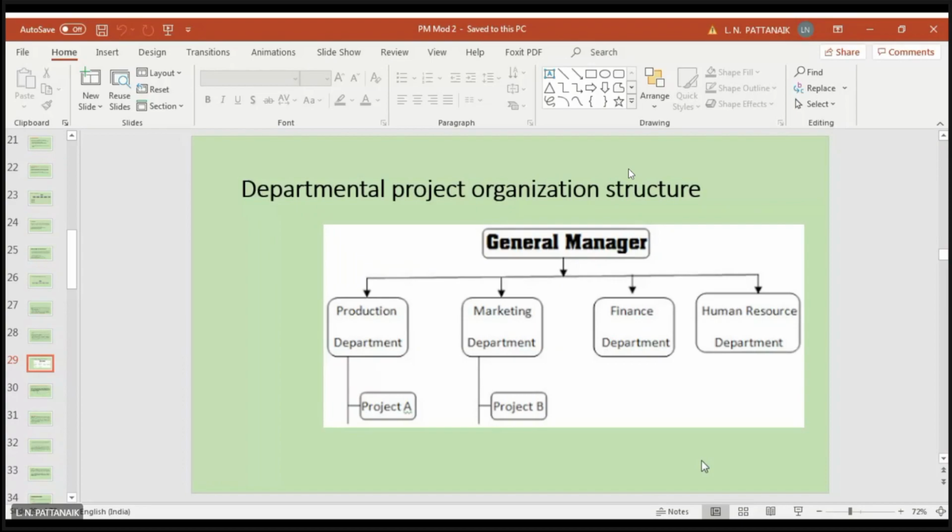So that is called a departmental project. These things mostly happen in companies that just want to expand some facilities or build some new structures. They have the facilities, equipment, everything. So in that case, they will just extend some workforce for that particular project for a particular time, that is for the schedule of the project, and that is called a departmental project organization.